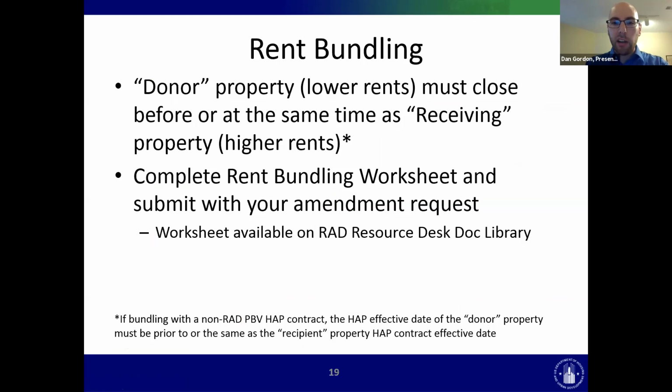So a couple of things to keep in mind if you decide to do this. Your donor property, the property that's giving subsidy to the other property, must close before or at the same time as the receiving property, which is receiving the higher rents. And if you wanted to do this, you would complete the rent bundling worksheet that's on the RAD resource desk, just to show us that you are maintaining the same overall subsidy. And that's available on the resource desk document library.